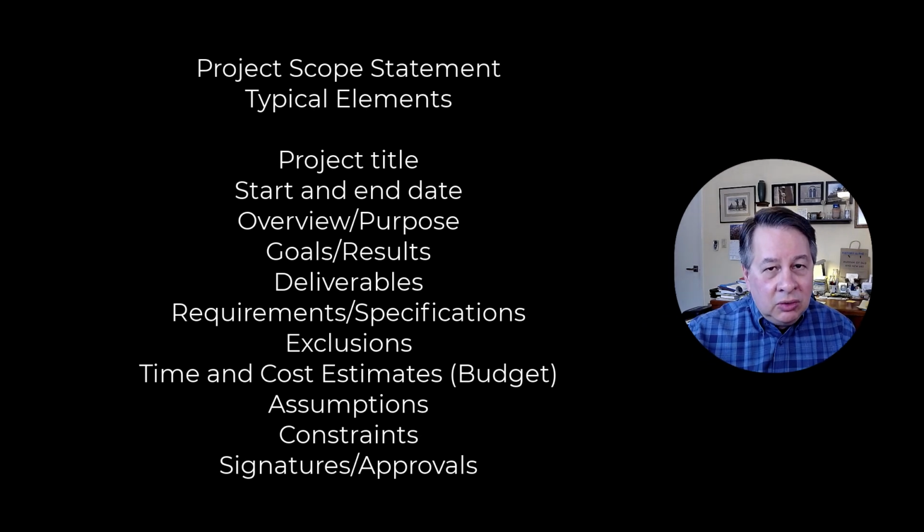For complex projects, you will typically prepare a project scope statement. It's a single document that brings together the major aspects of the project, defines the boundaries, and serves as a baseline for future decisions. You'll be referring to it frequently during your project, so you want to make sure it's well done and has everything that you need. It's like a mission and vision statement for your project. There are many different versions that exist, but the contents and organization are often similar.